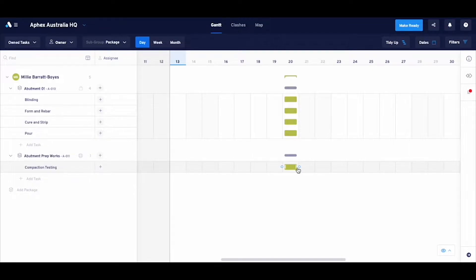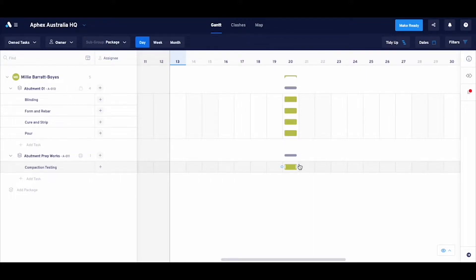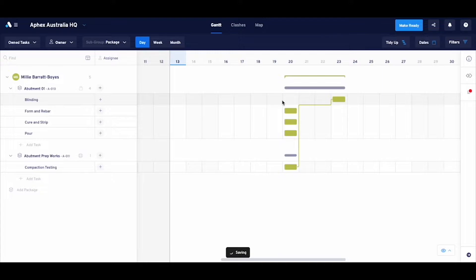Compaction testing actually needs to happen before everything else, so I'll link it to its successor by clicking and dragging the link to the other task, like that.